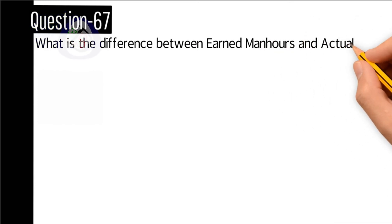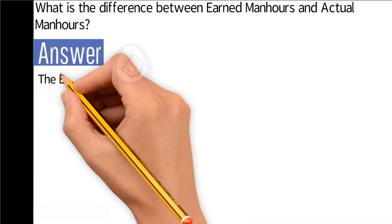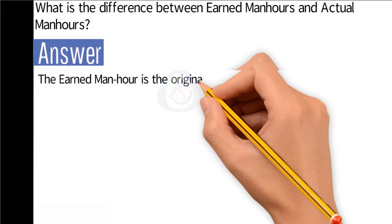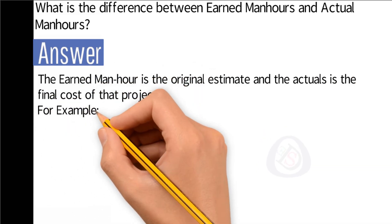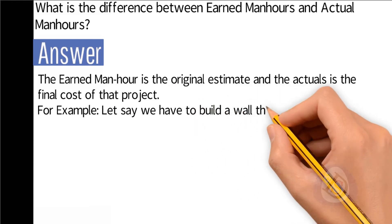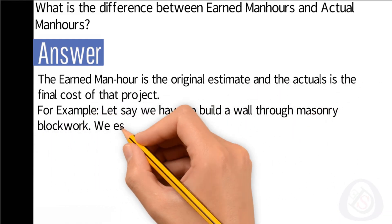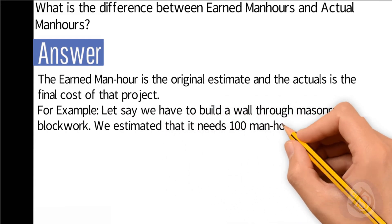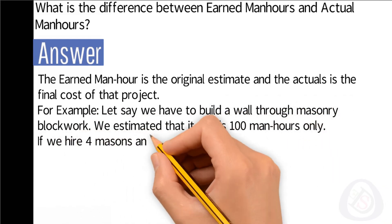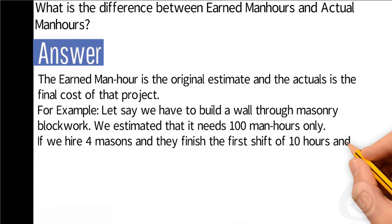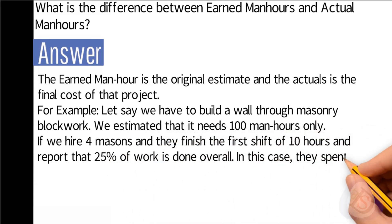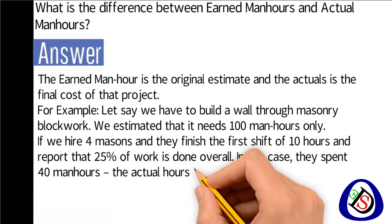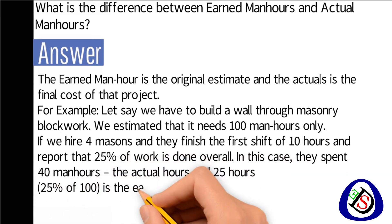Question number 67: What is the difference between earned man-hours and actual man-hours? Answer: The earned man-hour is based on the original estimate and the actual is the final cost of that project. For example, if we need to build a wall through masonry blockwork and estimated 100 man-hours — if we hire four masons and they finish one 10-hour shift reporting 25% of work done, they spent 40 actual man-hours, and 25 man-hours (25% of 100) are the earned man-hours.